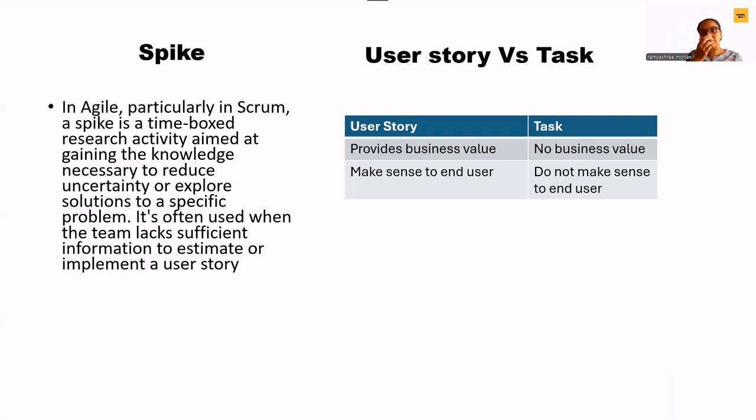So I told you, from the customer's perspective, either the requirement itself can be clear. In order to tell the customer, these are all the possibilities if this is a requirement, and if you say the requirement is that, these are all the possibilities. So the customer themselves can become clear, okay, fine, then I want this. That is one possibility. Otherwise, the customer can say, I want this, but then we are not sure how exactly it can be implemented. And if there are different kinds of implementations, then what are all the risks that can be associated with that? So something that you're not very clear about and you need to do research on, that is called a spike.